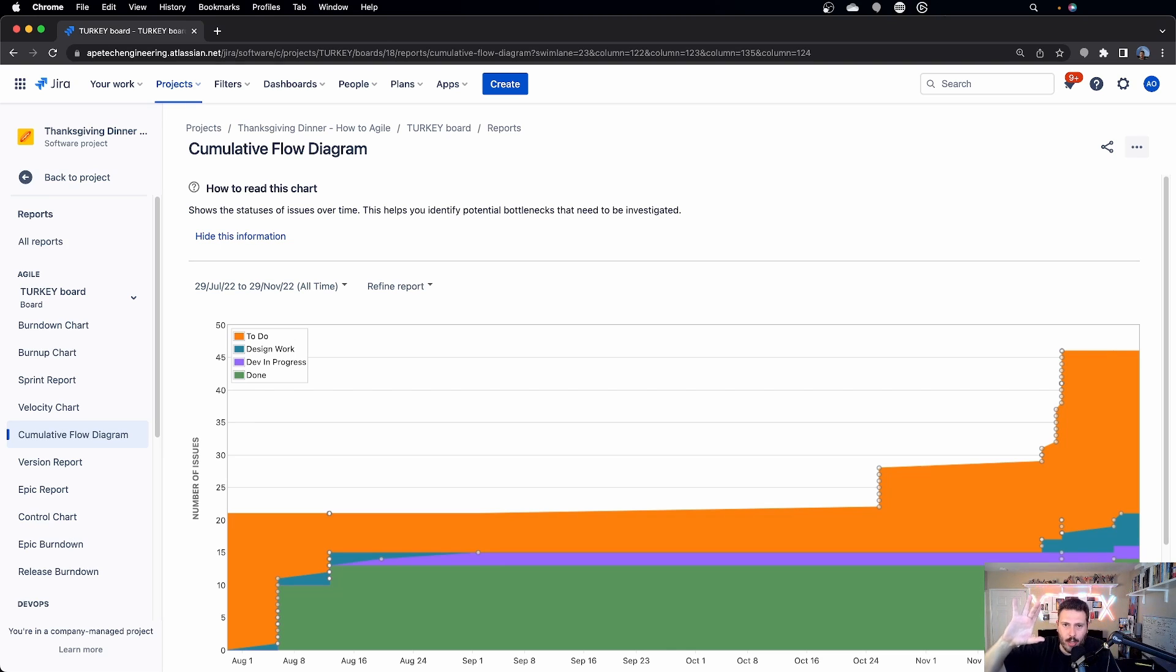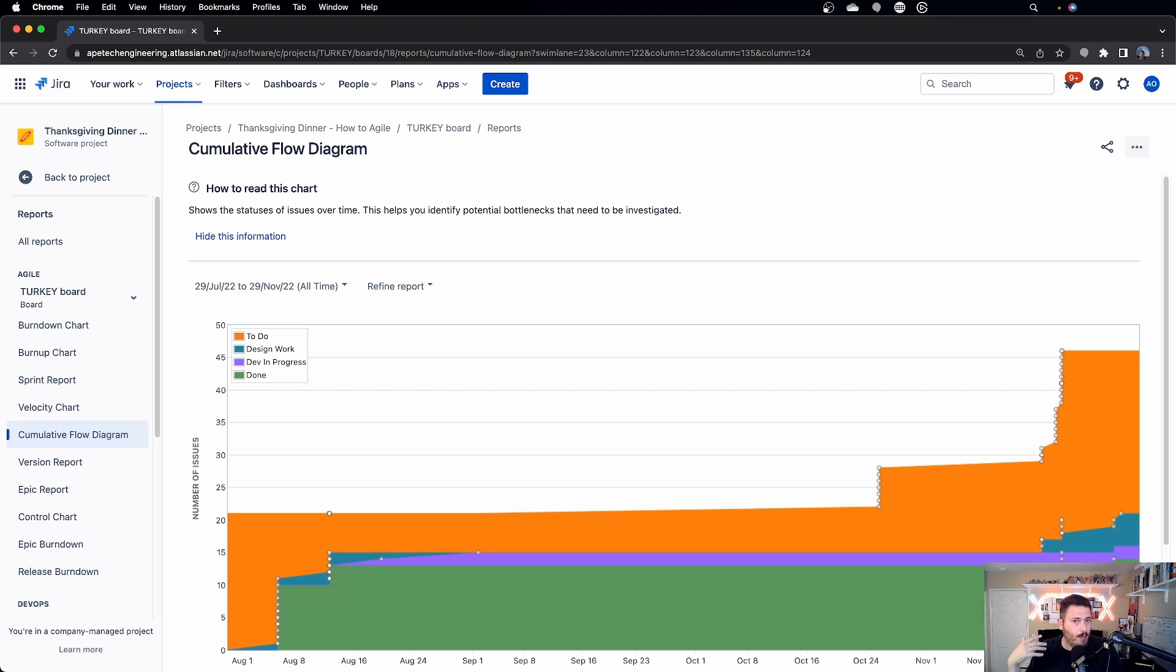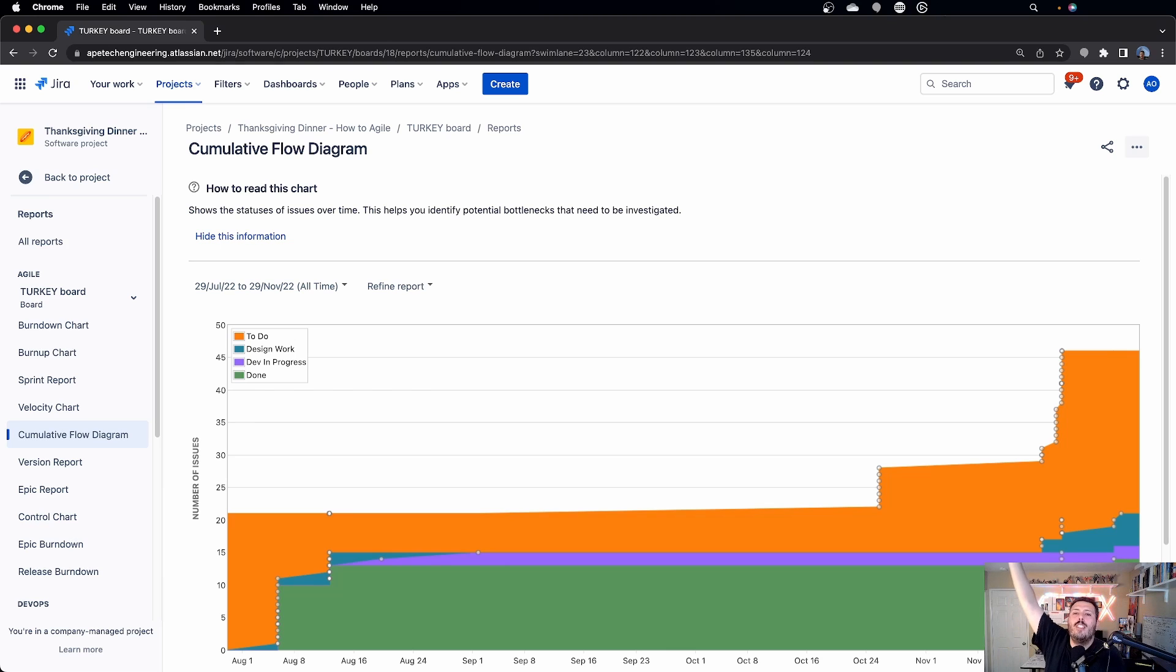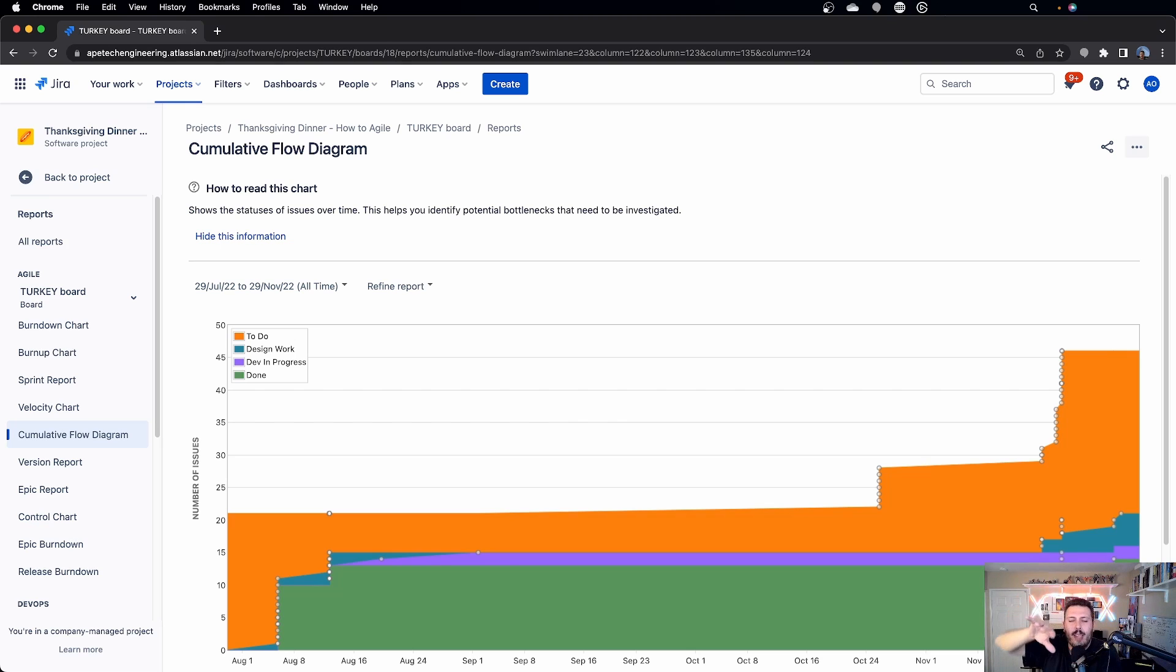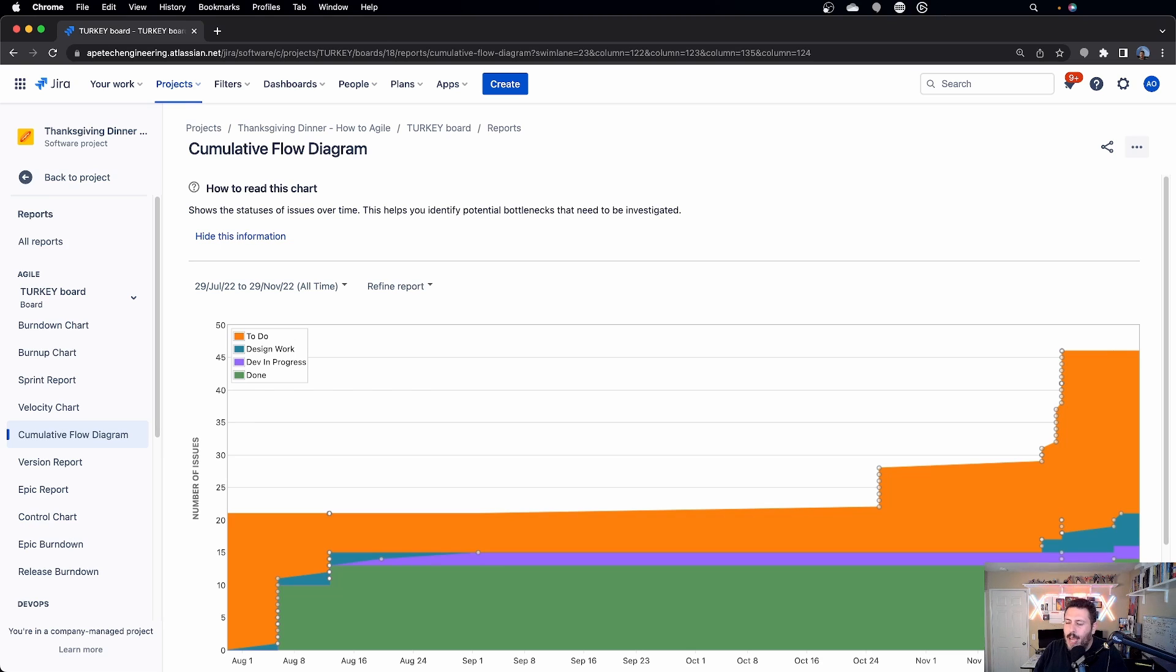The to-do should shrink over time. But if you see it growing, if you see it getting bigger, that means somehow your team's making up more scope. And so if that's blindsiding you, then that's a problem that you should go get addressed because to-do, your scope should for the most part be pretty locked unless you're playing this infinite game, in which case you still don't want to see giant spikes, because that can be like a whole new project and stuff like that. And so you want to watch for big giant spikes. But for the most part, your to-do should stay somewhat consistent doing kind of this, where you finish work, you introduce new work, you close some work, you introduce new work. You should be following that kind of a pattern.